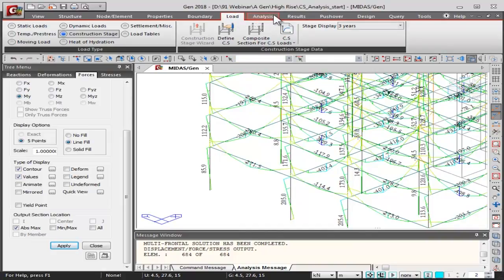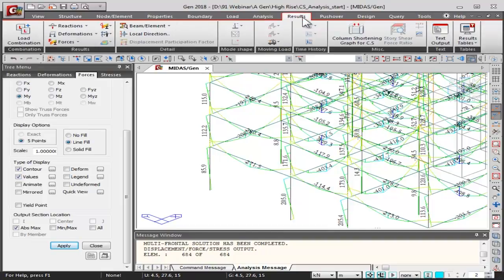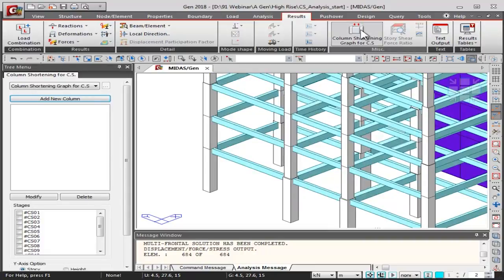We need to then figure out whether compensation should be provided through increased reinforcement or by changing the height of the vertical elements. These are the results for beam diagrams. After the column shortening analysis has been performed, we need to check the column shortening result. Midas Gen has a column shortening graph for construction stage analysis — a very useful tool.